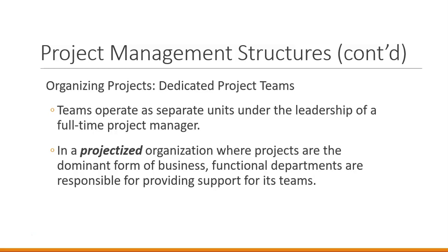Then we can also have a dedicated project team. This is where we have a separate unit set up with a full-time project manager who runs the entire project team. This is important for organizations where we have a lot of projects.